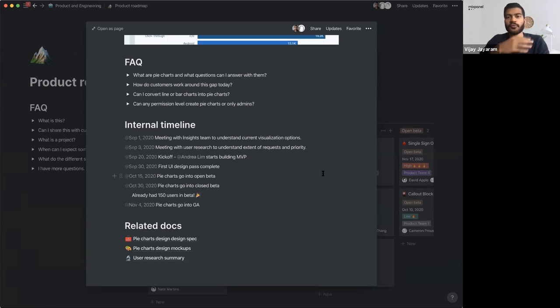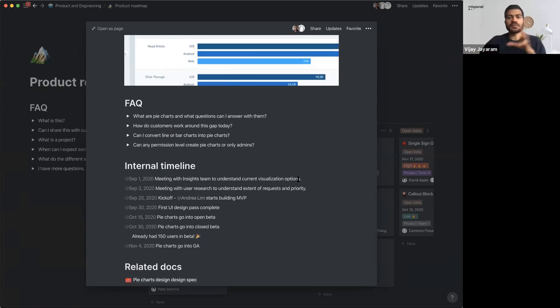However, we do that after we've built it, when we're retrospecting on how something went. We have a separate table that links into this table called retrospectives, which basically tracks for each project: when did we start, when did it reach each stage, what were we working on for what periods of time this year, and could we have done better?